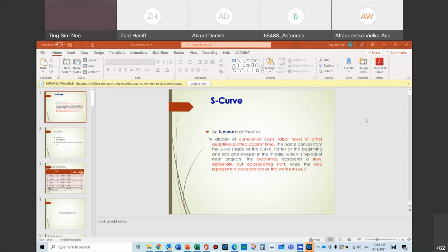You need a very standard amount of people, a very standard amount of machineries, and that all up rate will include all of them. We do not want you to split up, okay, this material, this work, you split up machineries, labor, material, and you do 3 calculations. Normally, we don't do that. If you want, there's nothing wrong with that. You can, but on accuracy, I just don't think it's necessary, because you're doing a lot of work, and yet it may not be meaningful at the end of the day. So what I prefer is just one rate.